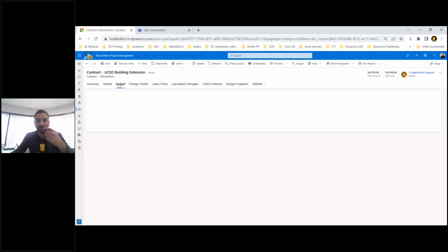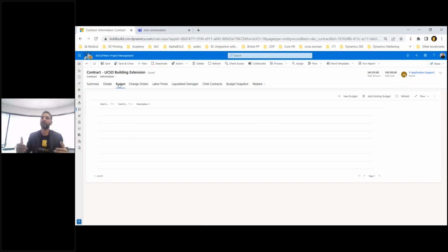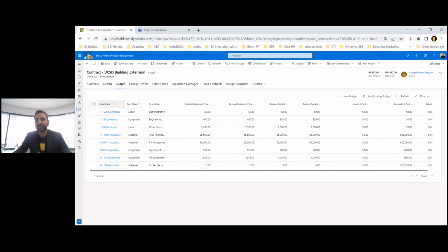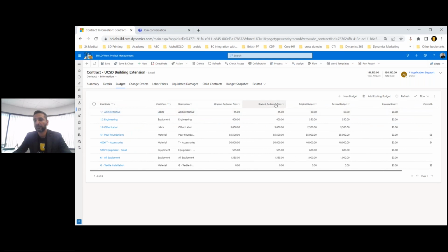What I also have is that I was telling you that when you as a general contractor do the whole estimation within our system, it generates the budget as soon as you generate the contract from that estimation. So you can see in here, I have original customer price for different cost codes. I have my revised customer price, my original budget, my revised budget. And one thing I'll point out is the labor cost code here, where the original budget was 2,500, but the revised budget is 3,500.